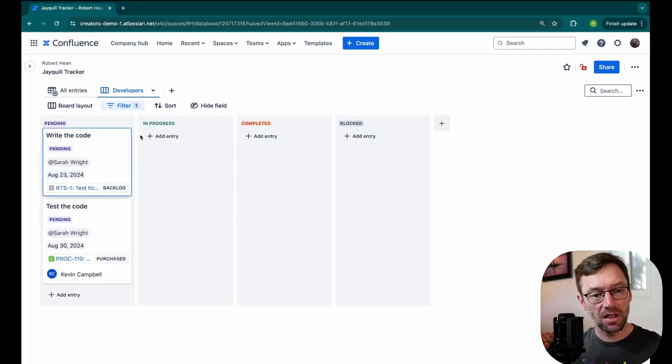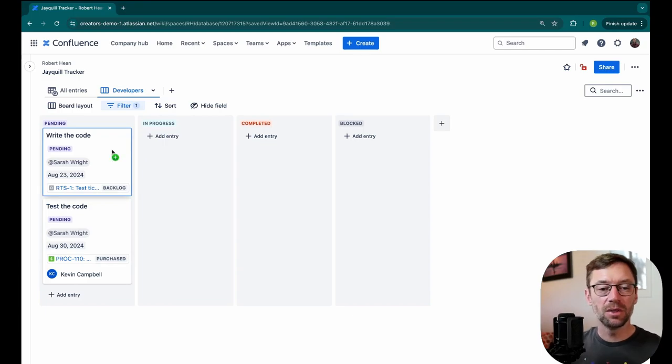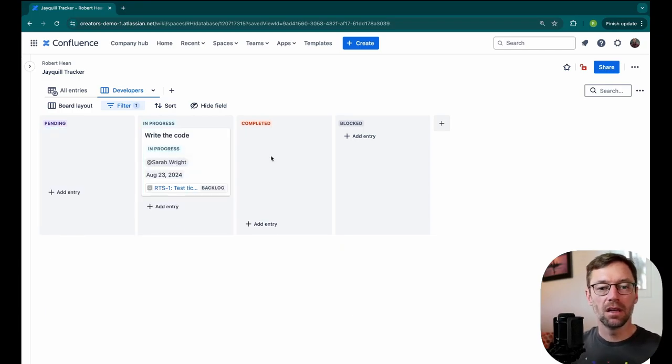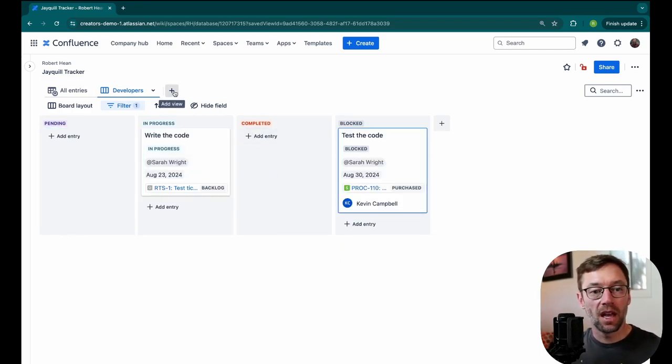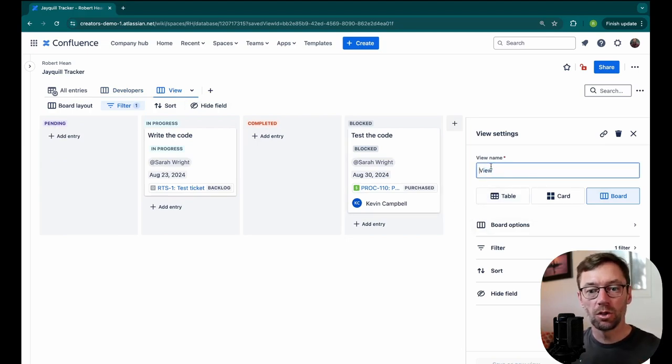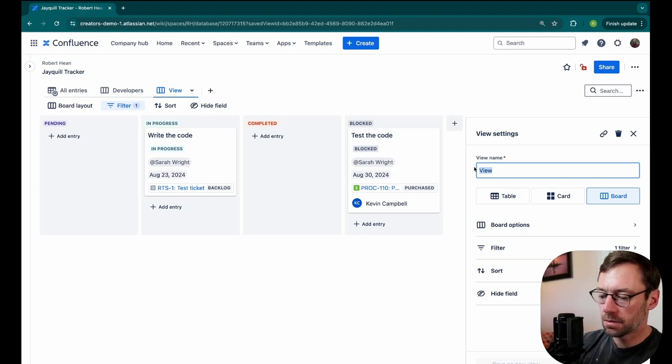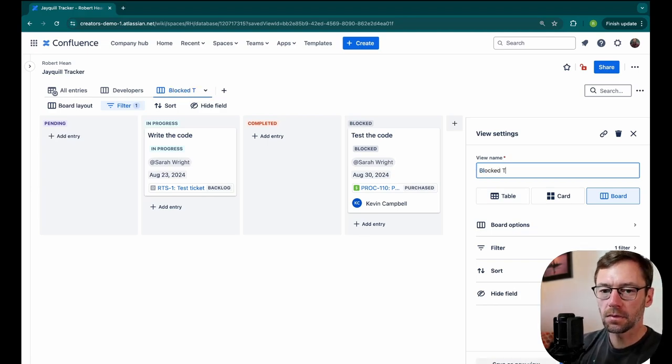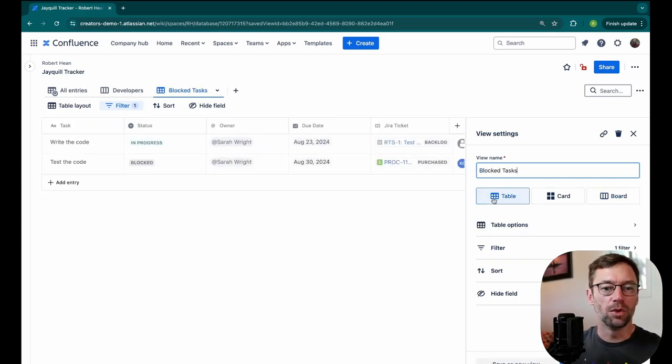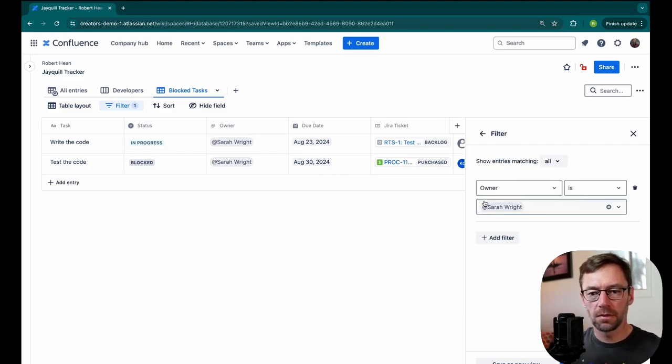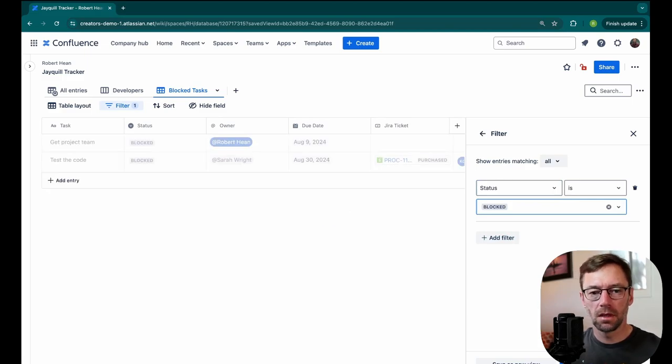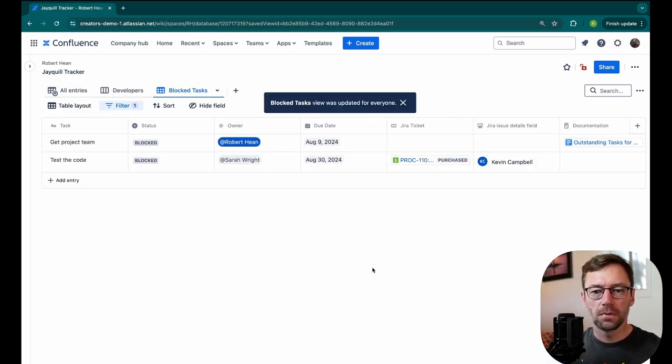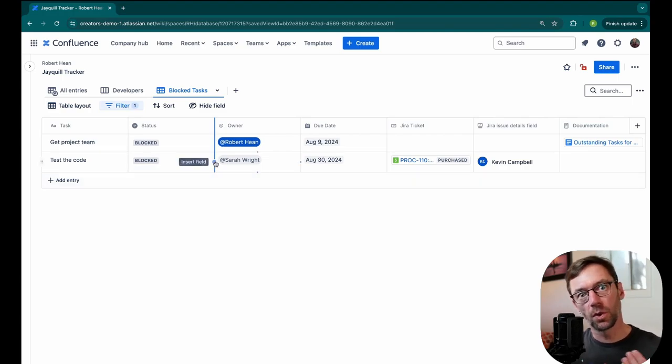So this doesn't necessarily update that JIRA ticket, but it allows Sarah to come in and quickly indicate if a particular task is blocked. I could repeat this for each person or each group. So maybe I want my executives to only see things that are blocked. I know they like a table view. So I'll change my filter. I'll pull up status and I'll say is blocked. I'll click update. Now my executives could come in here and only see the things that are blocked. So they could help focus in and get them unblocked.